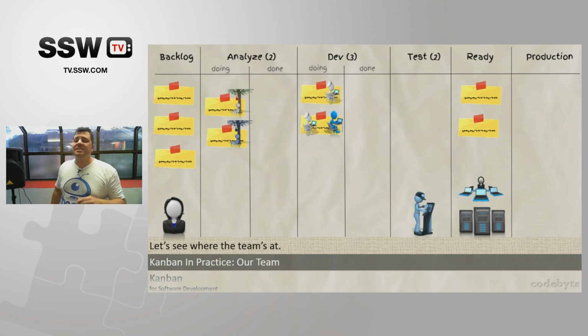If that's not the case, can he help the analysts make it a bit faster? Because as you can see, I actually have slack in my development. Or can he write some of these automated tests maybe? Instead of sitting idle, write some deployment scripts, write some automated tests. Or if none of them work, then the question to ask is, what can I do to make this tester valuable, add value to the team, to my team?